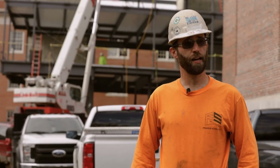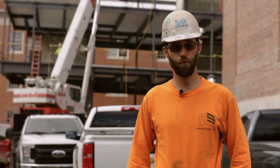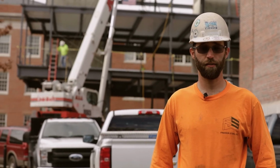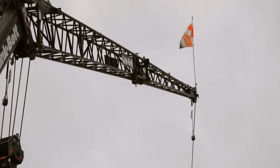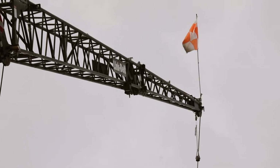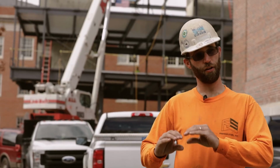It's been handy for keeping track of our time, our forms, keeping track of which parts of a project are taking the most time. We subdivide our projects into, say we have structural steel, we'll have decking that we lay, and we have bar joists that we put up. So we'll divide our job into the different sections of the job, and it's easy for the foreman or the men in the field to enter their time for whatever part of the project they were working on.